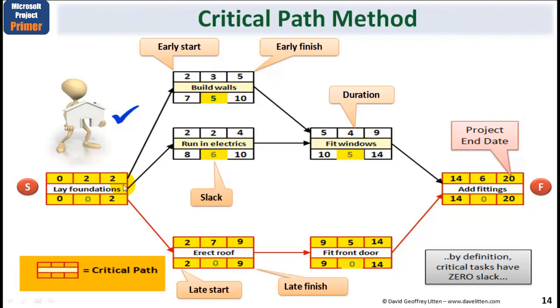And therefore the very last person, in project talk, would be on the longest path. And the person on the longest path would therefore be the critical path, and by that we mean it is time critical. So our intent here is to link all the tasks together, showing their logical dependencies, and ask ourselves when's the earliest finish date. And the earliest finish date in this case will be the longest path, and I've shown this here with a red outline with yellow highlights.